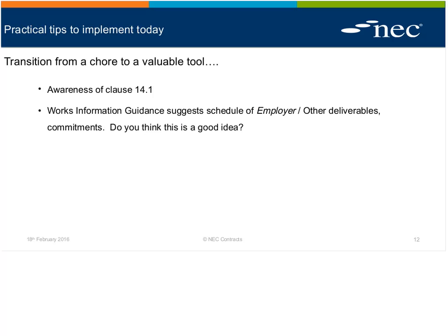It doesn't change the contractor's obligation to provide the works or liability for his design. So if the program is greatly lacking or unrealistic and it's accepted by the project manager, if the contractor then fails in his endeavours and it's deemed the program in retrospect was deficient, then the project manager is not complicit in that failure. It's not diluting his obligations.